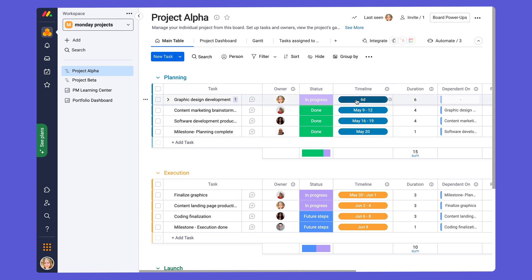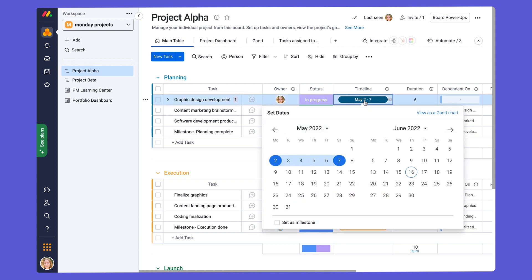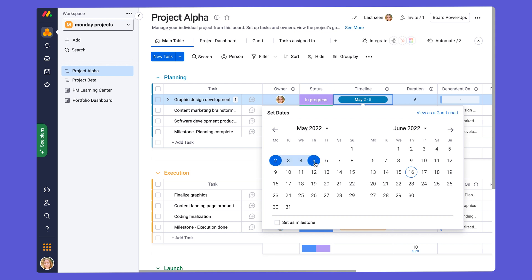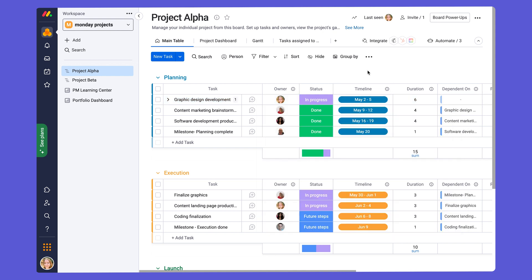There are two ways to add timelines to your tasks. The first is by simply manually adding the timeline using the timeline column. So here we just click on any column cell within the timeline column. We pick the start date that we'd like to start at. And we click the end date and we'll see that the days within the timeline are highlighted in gray. And it'll be reflected within the timeline column.